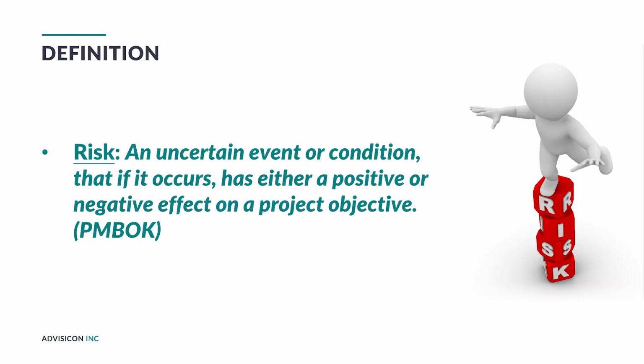Very good. Okay, so I just want to start at a fundamental level and just talk about risk. Risk is defined by the Project Management Body of Knowledge from PMI as an uncertain event or condition that, if it occurs, has either a positive or negative effect on a project objective. Now, a lot of people tend to focus on the negative effects, the negative risks, but it's important to understand that there are also positive risks, and those are known as opportunities. So when factoring your risk management process, you have to make sure that you take note of positive risks, which could be opportunities, and there's a whole process around identifying those and having strategies around how to deal with them. So I like to call that out.